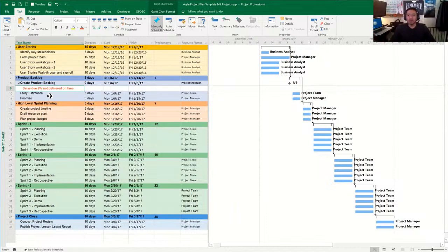Yes, but you also have to question historical artifacts. Has this task been repeated in the past? So you can go back and get lessons learned from it and have that story. Okay, we finished this task in 20 days, but in reality, it's going to take us 15 days. There's a difference. So I would always refer back to previous schedules and measure that against your reality of things.